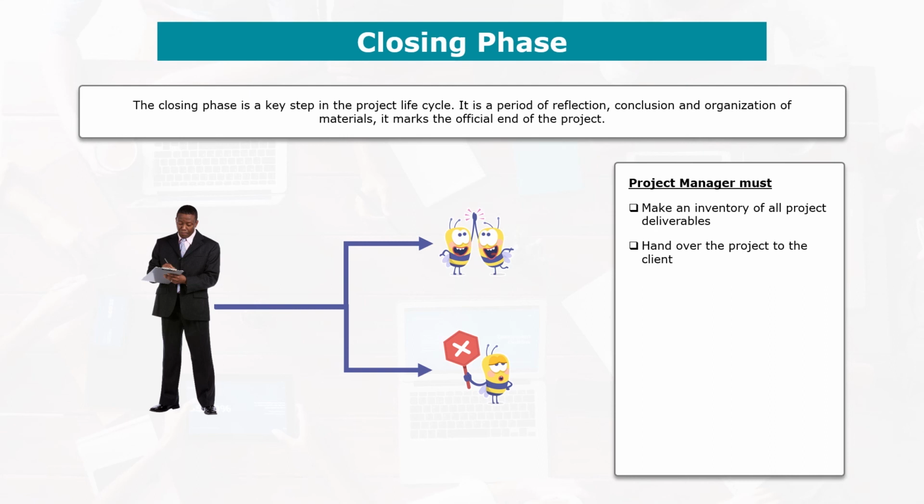Sometimes, or most of the time, he will have to hand over the project to the client or to the team that will be responsible for the day-to-day operations of the product or service resulting from the project. As a project manager, you will have to conduct a retrospective meeting on the project to discuss and record lessons learned, and that can be used for future projects as well. You will have to organize all your project documents in a centralized location for them to be easily accessible by the other project team members or any other person that would need them in the future.